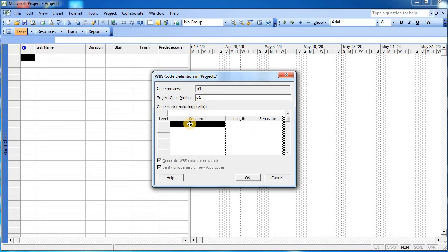Now we will consider that the main activities are grouped along with their sub activities. It means that many of the sub activities will come under a main activity. So we will create the levels. This is the first level. Over here the first level we will consider as the uppercase letter, and length we will not specify, so let the length be any, and the separator is converted to slash, because dot is almost invisible and plus represents some mathematical symbol. So it is better to utilize